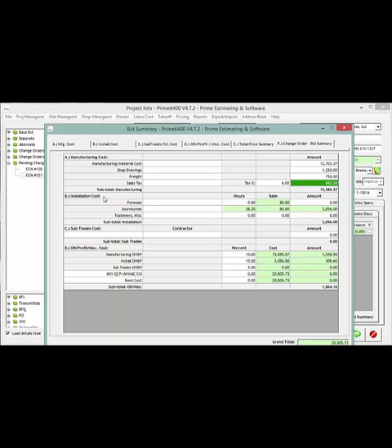We move on to the installation cost. Here we would carry forward the install cost from the takeoff back in this area in the prior screen. From there, we can then generate an input, maybe foreman's hours. Maybe you want to add 8 hours for the foreman to be put in. We also have the ability to put in the value for fasteners, cup washers, any site requirements for materials, etc. Those can be placed in here and picked up also.